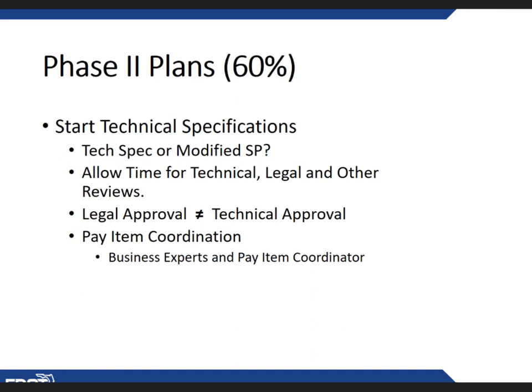You need to know what's in the spec, what's in the standard, and just because legal doesn't have any concerns over it, it hasn't violated a Florida statute, does not mean that it's a good specification that we want to use. There are some things that we've used tech specs over and over again for 10 years, and people keep copying a spec. But what we found, I've actually seen in the past that they are referring to a product that no longer exists, or that we can't actually meet the requirements in the spec.